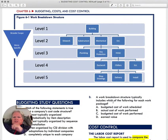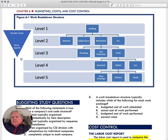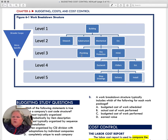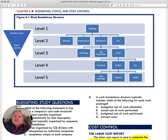Let's talk about the work breakdown structure for a moment. It's very important to remember that the WBS should drill down to more specific detail as you break down into smaller levels. This triangle diagram demonstrates that — at the top is the broadest scope, the whole building. Then you break it down into site work, substructure, and mechanical. Level three gets more granular into plumbing, fire protection, and HVAC. HVAC then drills down further into ductwork, chillers, and so on — shop drawings, delivery, and install. At each level going down, it gets more specific.